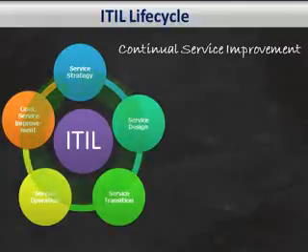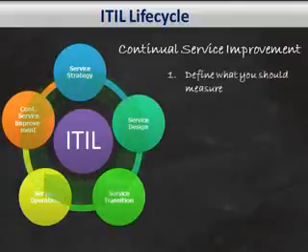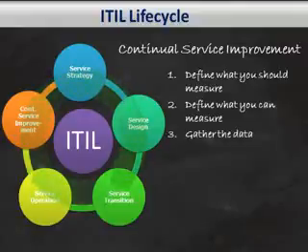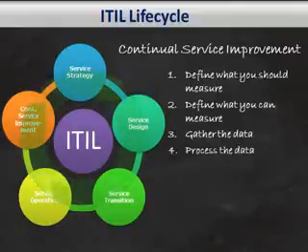1. Define what you should measure. 2. Define what you can measure. 3. Gather the data. Consider this: who, how, when, and what's the integrity of the data. 4. Process the data. Well, how frequently? What system? And again, what is the accuracy of this data?